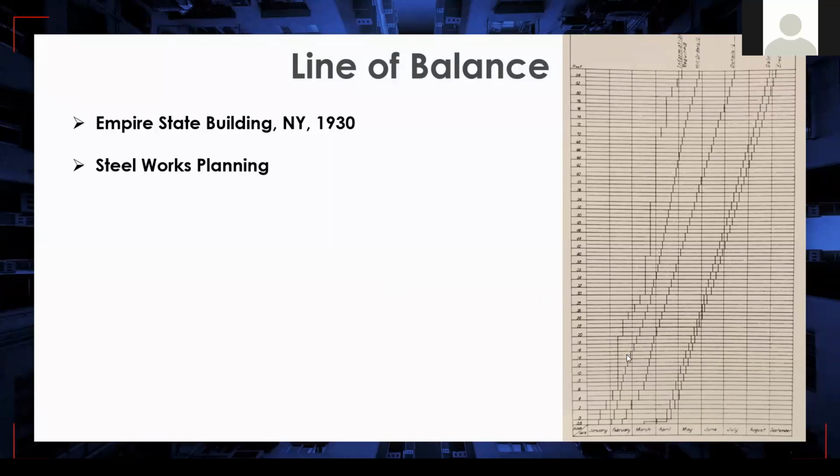The other thing we need to make sure is that these 2 disciplines, which can represent different resource crews or any other repetitive following activity relationships, are not clashing on the same location and in the same time frame.